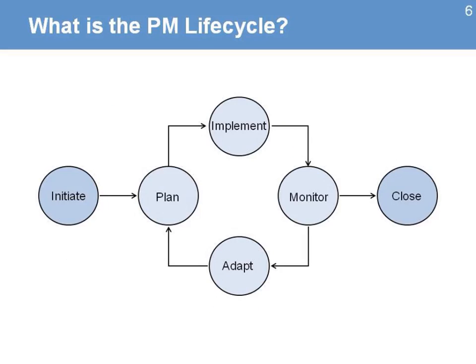And this is our graphic of the project management life cycle. It consists of six phases. There is an initiation phase that begins once the project is approved, the donor has approved and signed the contract, and the organization has appointed a project manager. So the project management life cycle begins once there is a project manager and a project team.